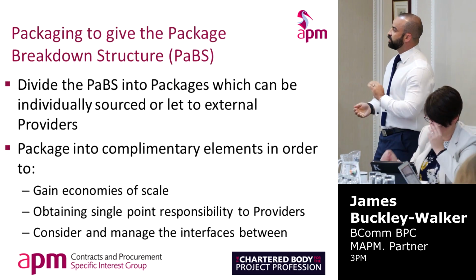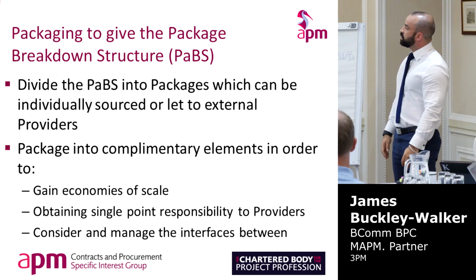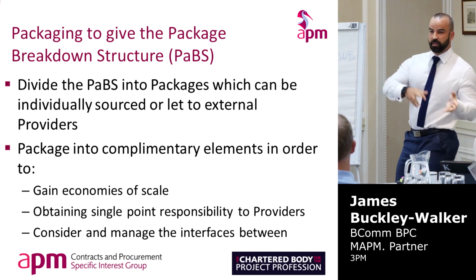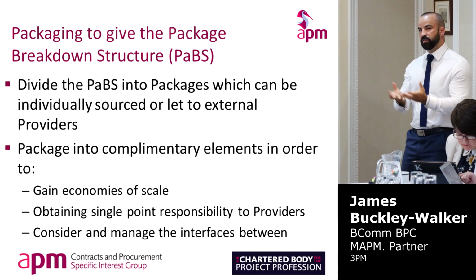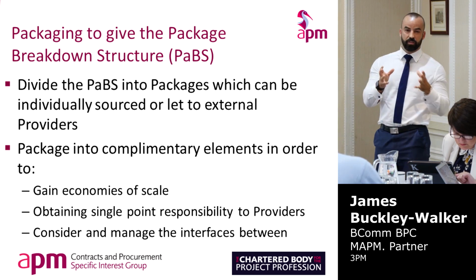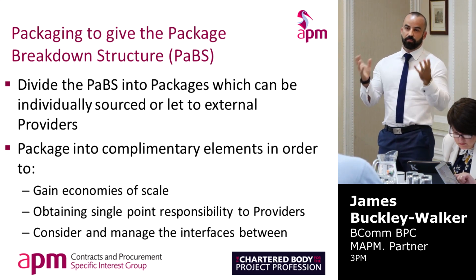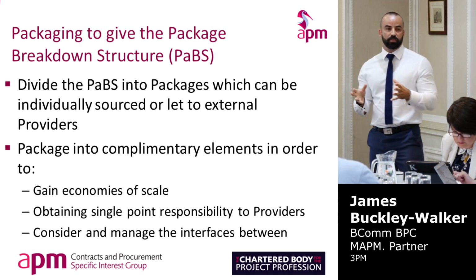So next, we've got our package breakdown structure, we've got all our packages, and now, whether we're internally sourcing them or externally sourcing them, we want to make sure we can bring those together into packages, either to gain economies of scale, to make them more attractive to the market, or for a single point of responsibility.